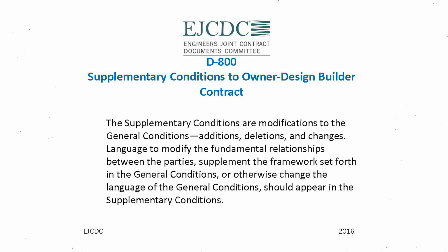We included in this series too a supplementary conditions document, which is a new document as well. But this provides you the flexibility to include the general conditions as is, and then be able to modify certain sections. And then we also provide a lot of examples of where we've made assumptions in the general conditions, so this will be the provision that you would want for a different site conditions clause. Within our supplementary conditions, we've provided examples of alternative languages of different types of provisions, because you see a lot of variation in the design build procurement process.